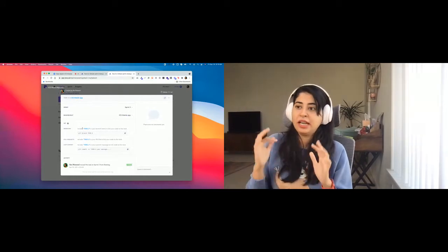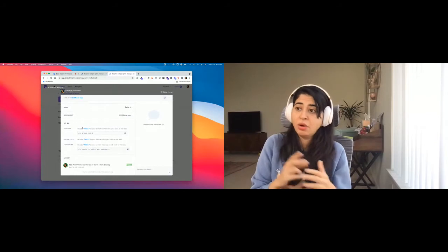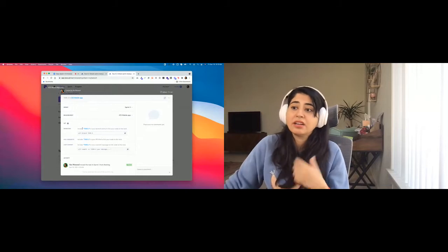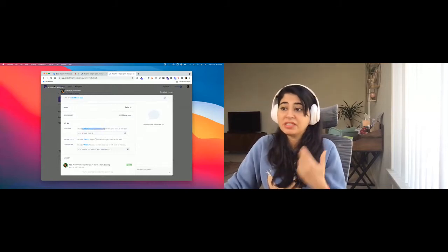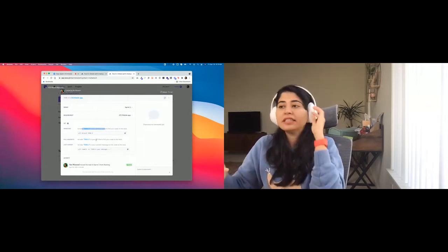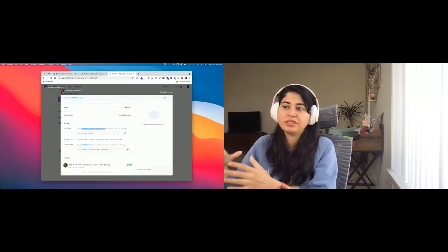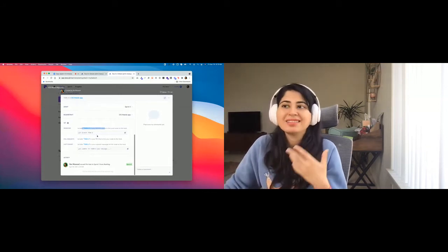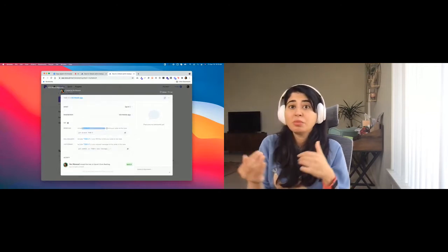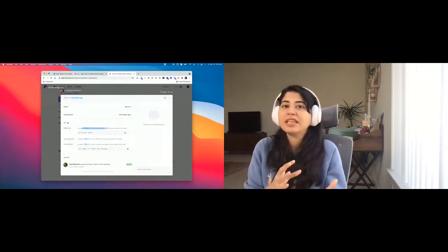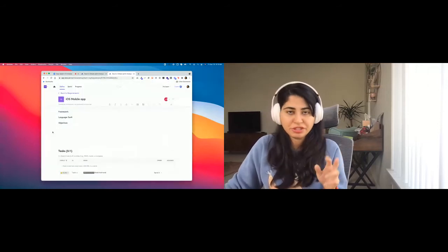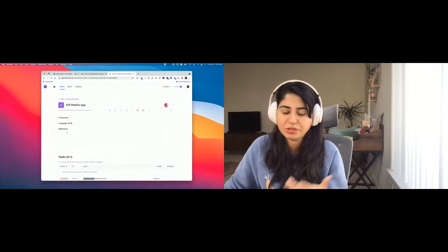As a developer, if I use the task ID in GitHub or in my existing source control application, it automatically shows the specific status of the pull requests or the commit. So as a team, let's say that I'm someone that's just trying to stay in GitHub. I don't want to keep updating the status of the task inside the project management application. What happens is when you use your task ID, it will automatically update the status of the task inside Tara. So that's one of the magic features that 26,000 developers on Tara love.